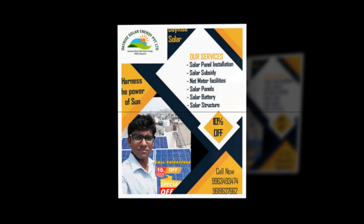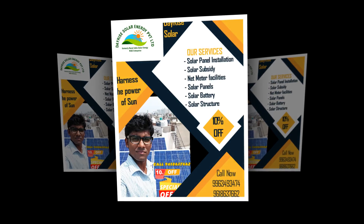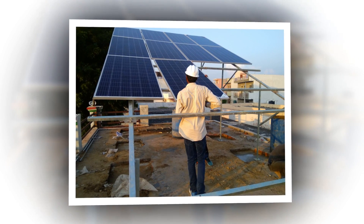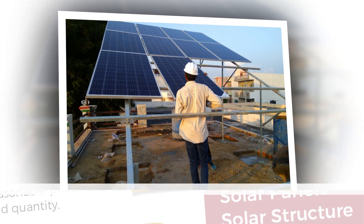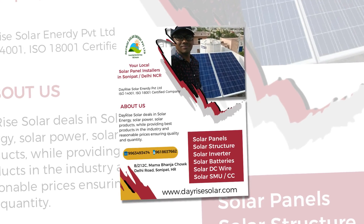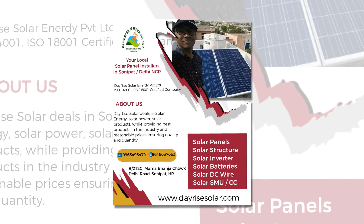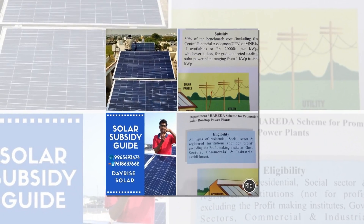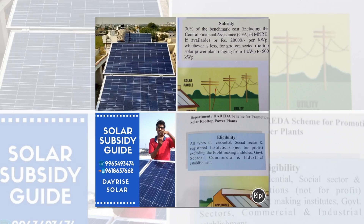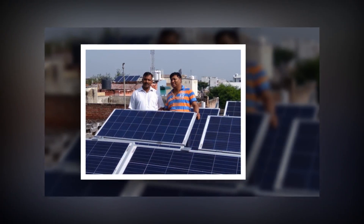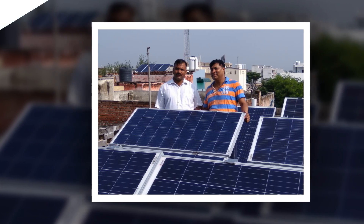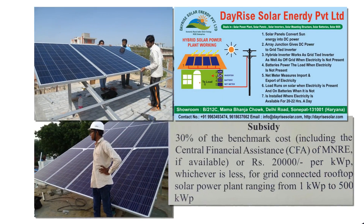Step 3: The Renewable Energy Department under the ADC acts as the district nodal agency for pre and post installation inspections of the site, and coordinates with SNA and MNRE for the grant and release of MNRE solar subsidy. Step 4: Upon inspection of your empty roof by the Delegated Project Officer or Assistant Project Officer, the formal go-ahead sanction for installation of the solar plant with subsidy is granted and communicated to the individual by the CPO/ADC of the concerned district via registered email and SMS.